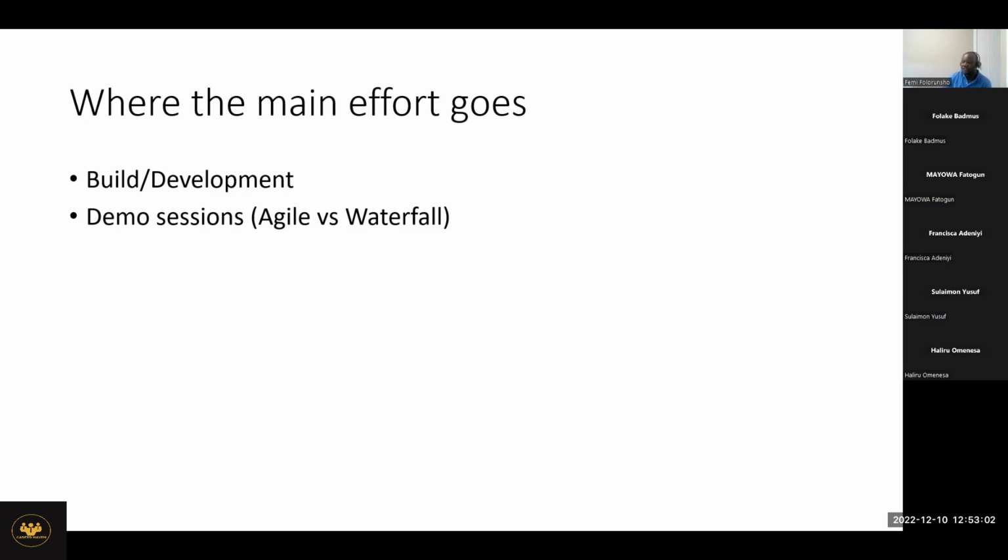What is the value that this change is bringing to the project? So we'll do a change management assessment at that point. And it doesn't add any value. Why does our employee need to post on LinkedIn that they're going on leave? But we don't want to trash what they are bringing. We will assess it. Ask the development team how long will it take if you want to integrate LinkedIn on this leave approval. Oh, they're saying it's going to take another 3 months and we don't have the budget for that.